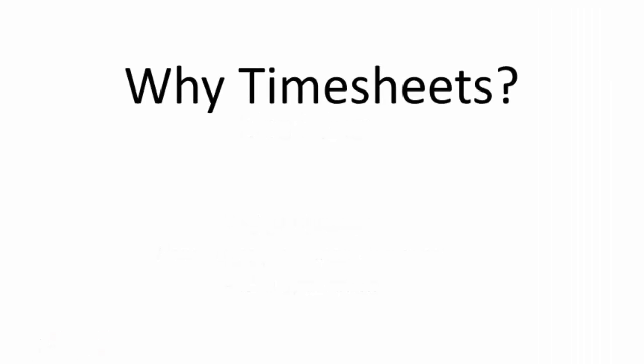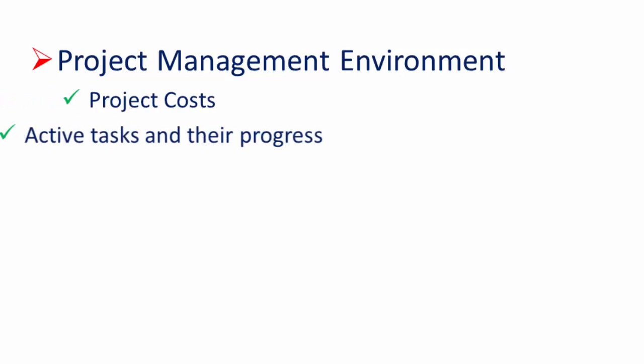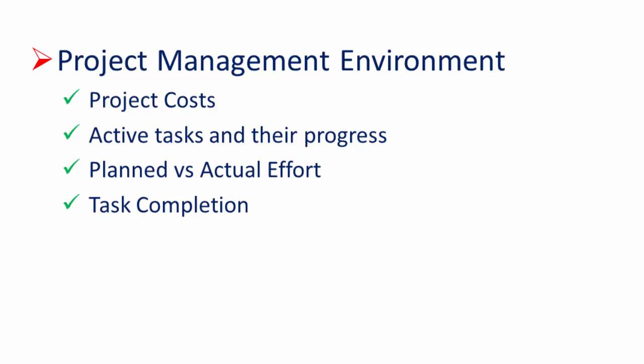Why do we place such importance on timesheets at Bijingo? Well, we know that accurate and timely recording of the hours that you spend on tasks is essential in a project environment. It keeps vital project information up to date, such as project costs, what tasks are being worked on and their progress, how actual effort is tracking to plan, and when tasks are completed.